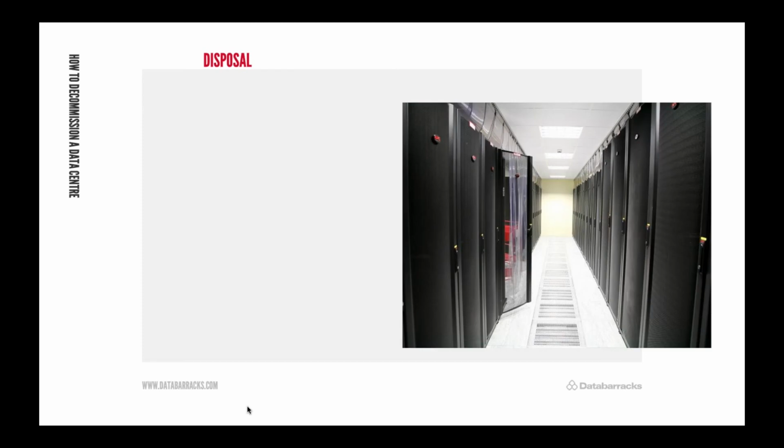And then the last section here is on disposal, which is relatively simple. There's the shipping of hardware that you're able to keep to other sites. There's recycling or disposing safely of anything that won't be reused. And then there's the secure destruction of any disks and any data. I'm not going to spend any time talking about this because these are things that inevitably everyone's already doing. You've probably got relationships with secure disk disposal companies, etc. So the thing to factor in here is the time and the additional expense that's likely to come at this stage.